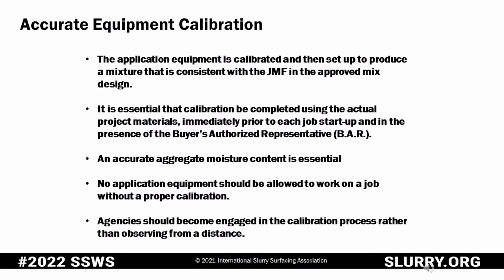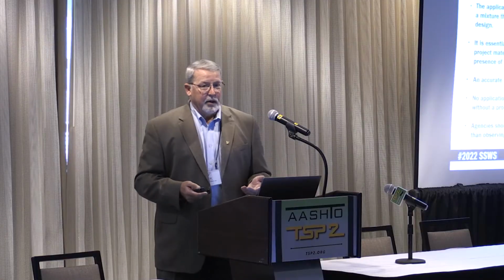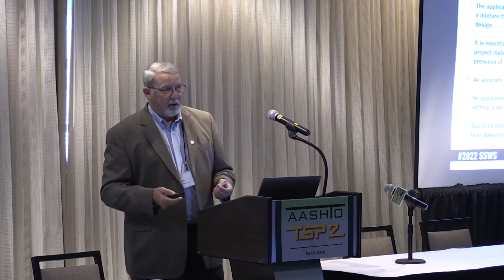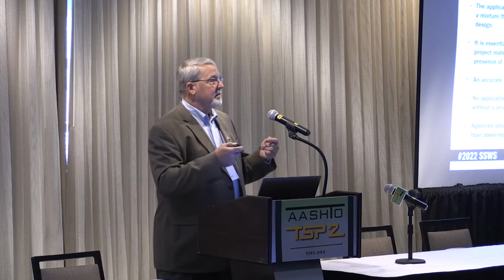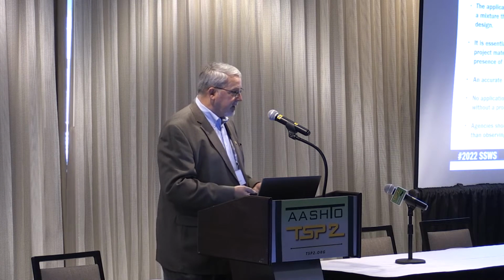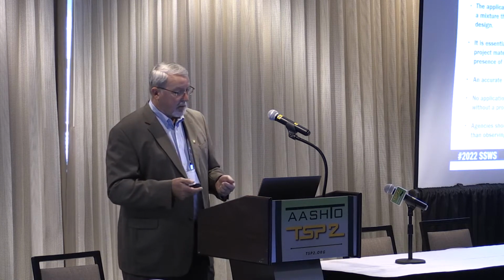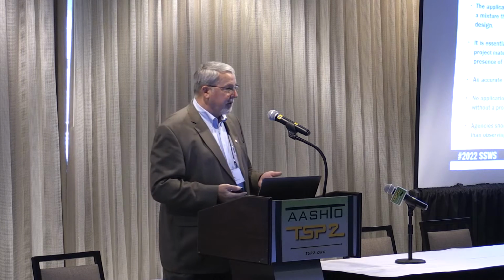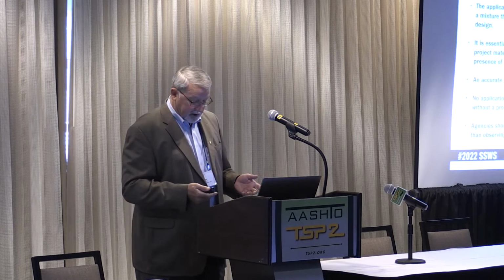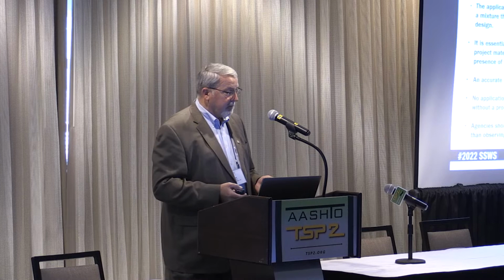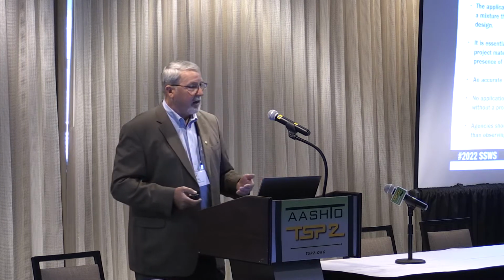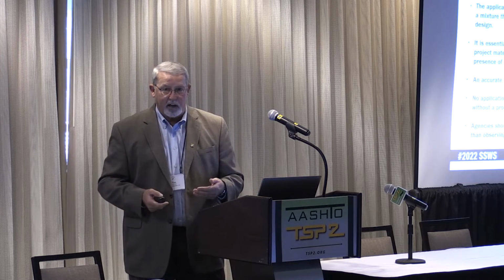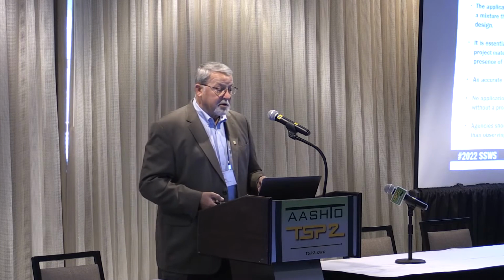Accurate equipment calibration. If you take nothing else from this presentation, know that you have to calibrate this equipment on a regular basis to stay on top of the mix that it's producing. Right now we don't have the opportunity. We do have studies that are ongoing that will help us with extractions down the line to verify our residual asphalt contents, but we're not there just yet.